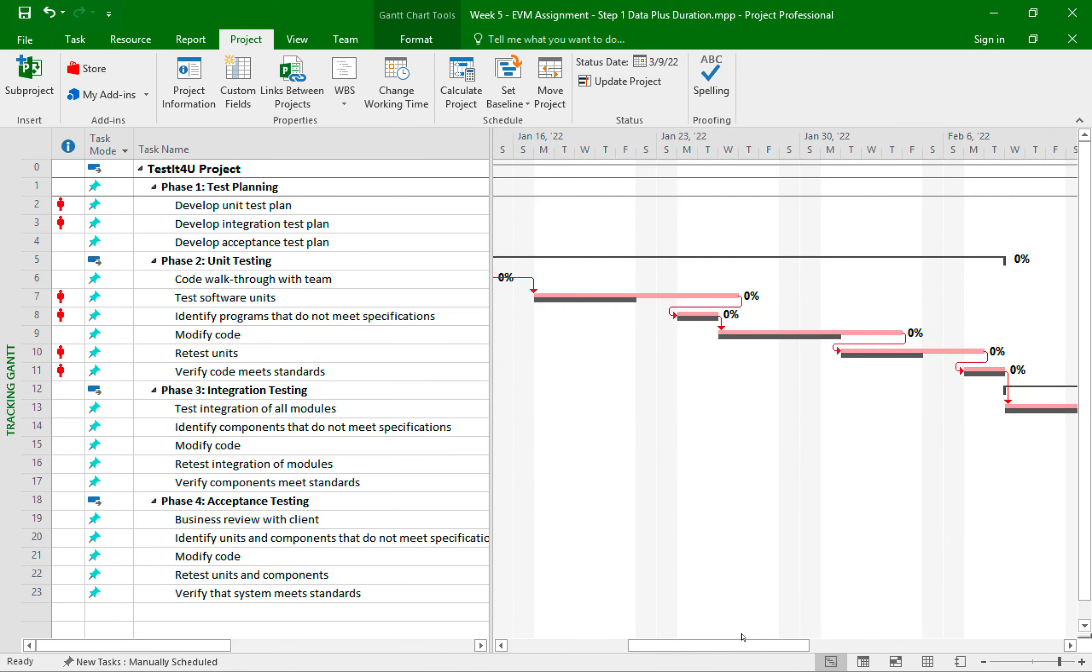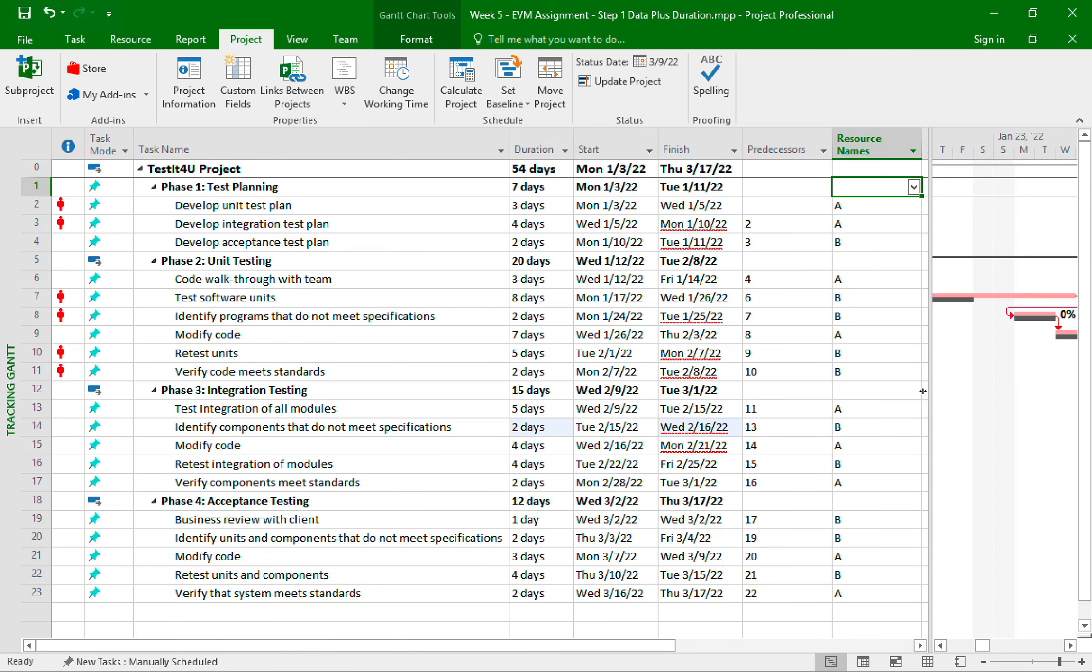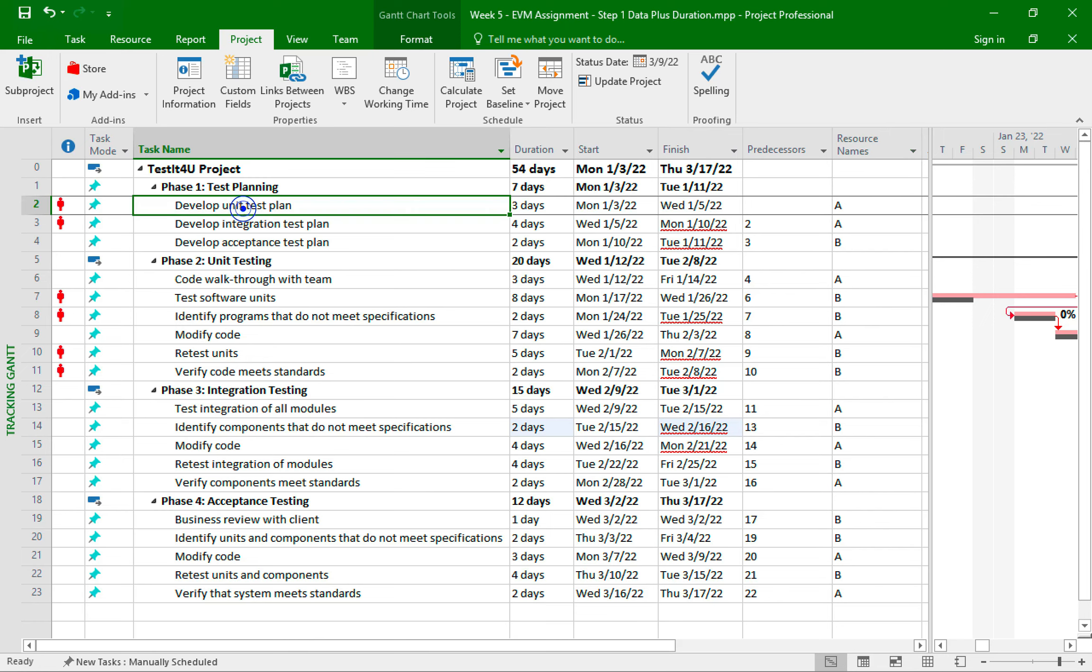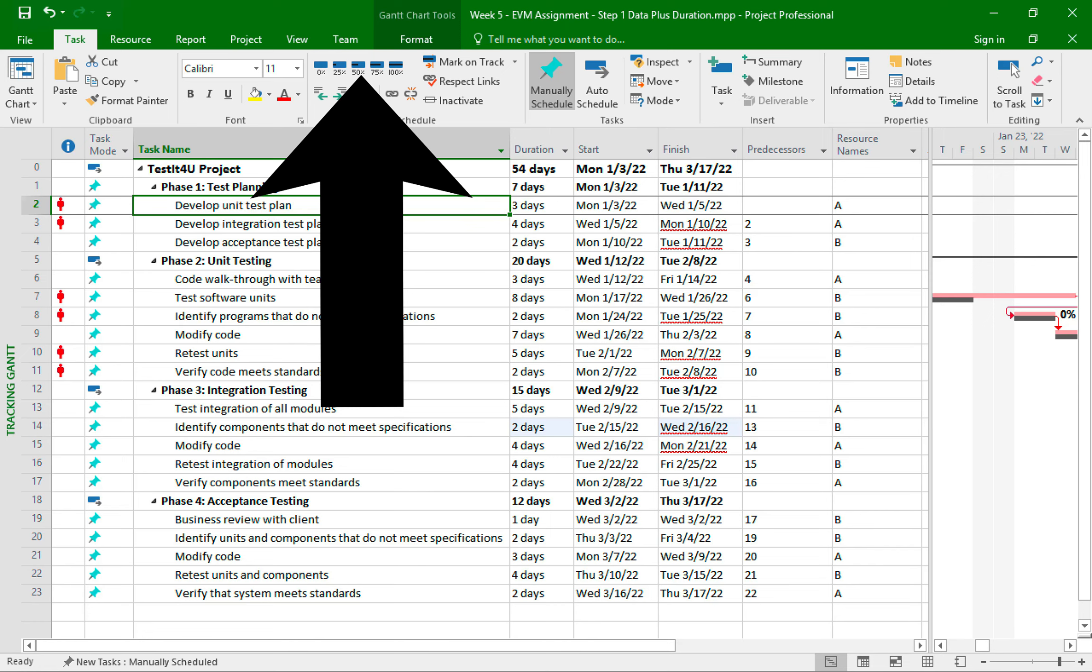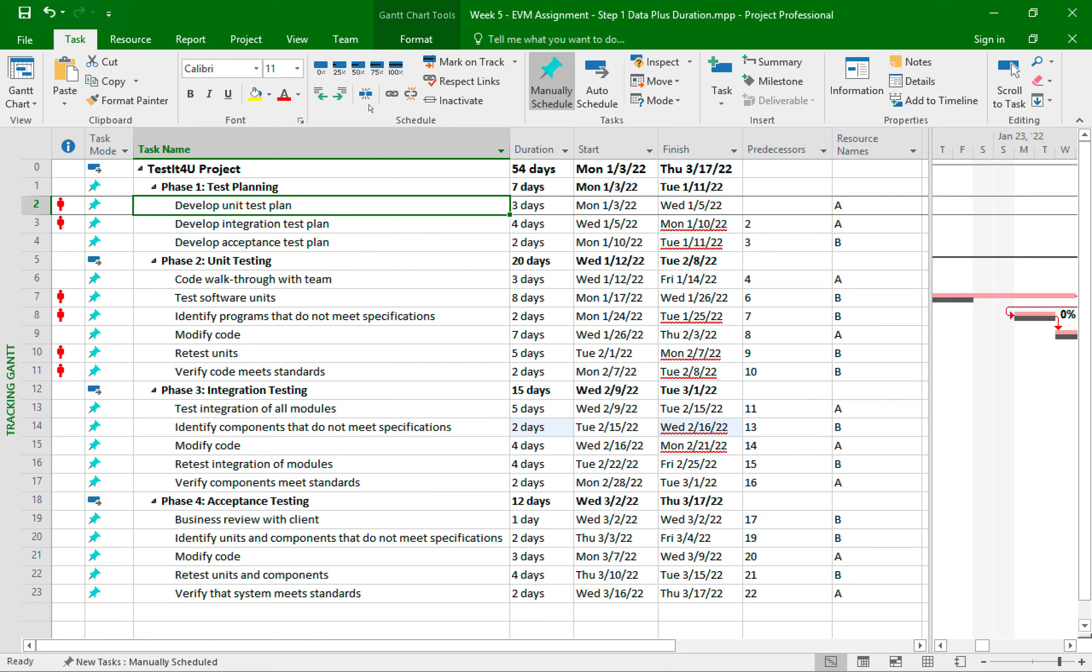The next thing we need to do is also update the percentage completed. And again, this is per the step two instructions. There are actually a few ways to update the percentage completion of a task. Probably the quickest way is to just click on the task you want updated. So let's start with the develop unit test plan. And then from the task tab, we can see these presets of the percentage completion. We have 0%, 25%, 50%, 75%, and 100%. I'll click on 100% since that's what the assignment step two instructions asked me to do.